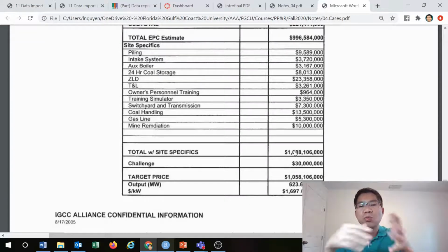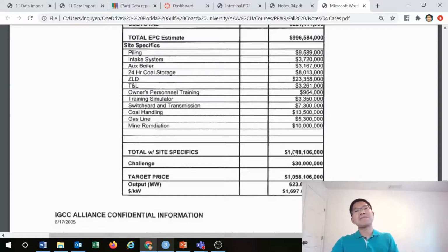Believe it or not, 1 billion at the start, and at the end of this project, when it was completed, 3.5 billion. So you see that basically a 250% increase in the cost over budget for this project. That's why this project created many problems. If you go back to lesson 1 on Canvas, I put a link about what technology they use for this power plant.